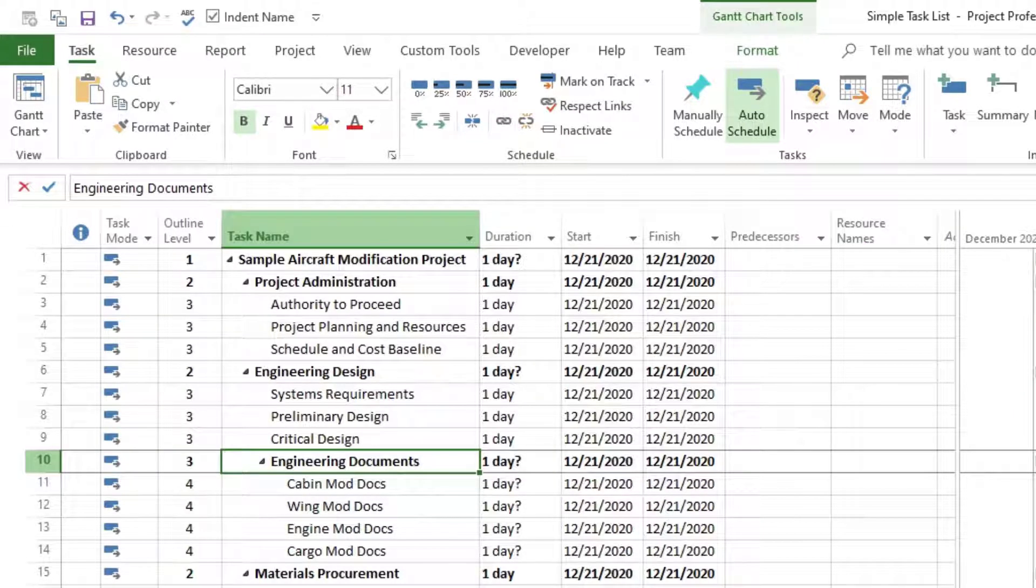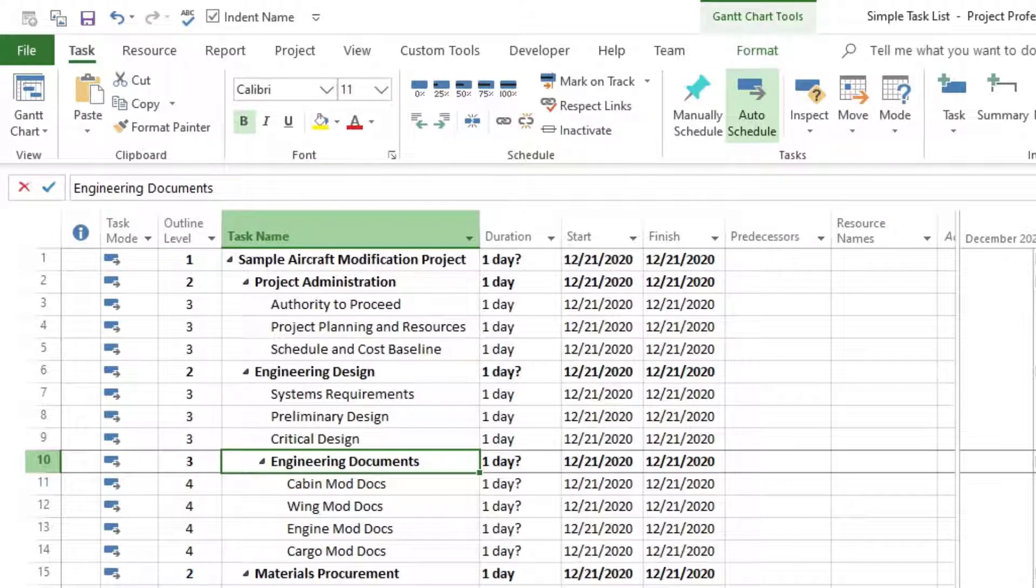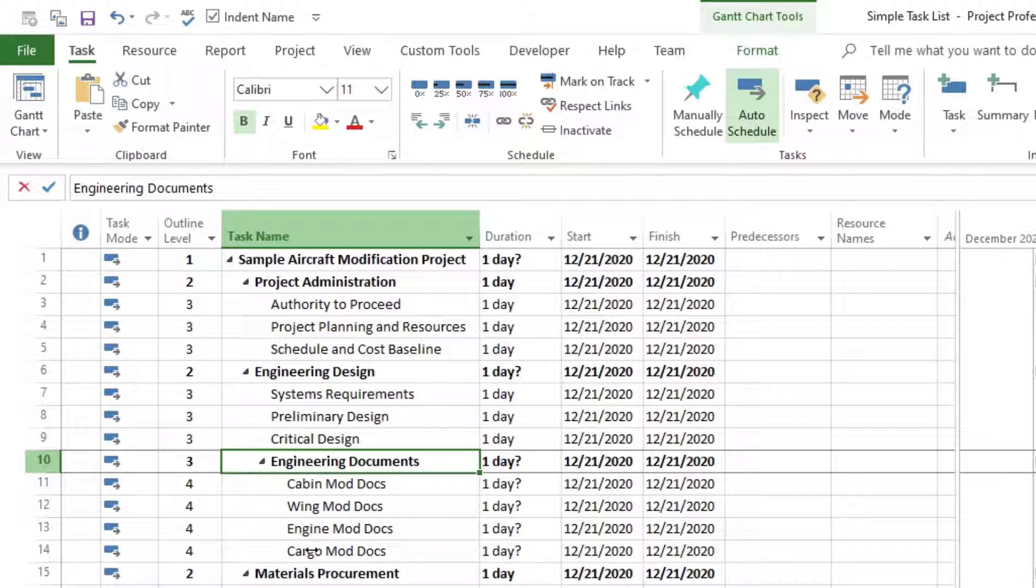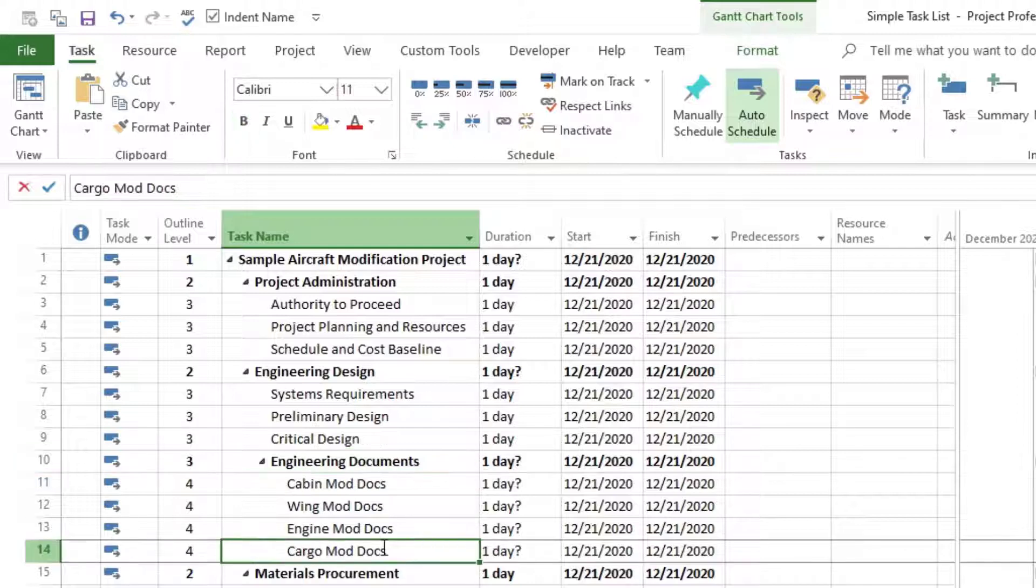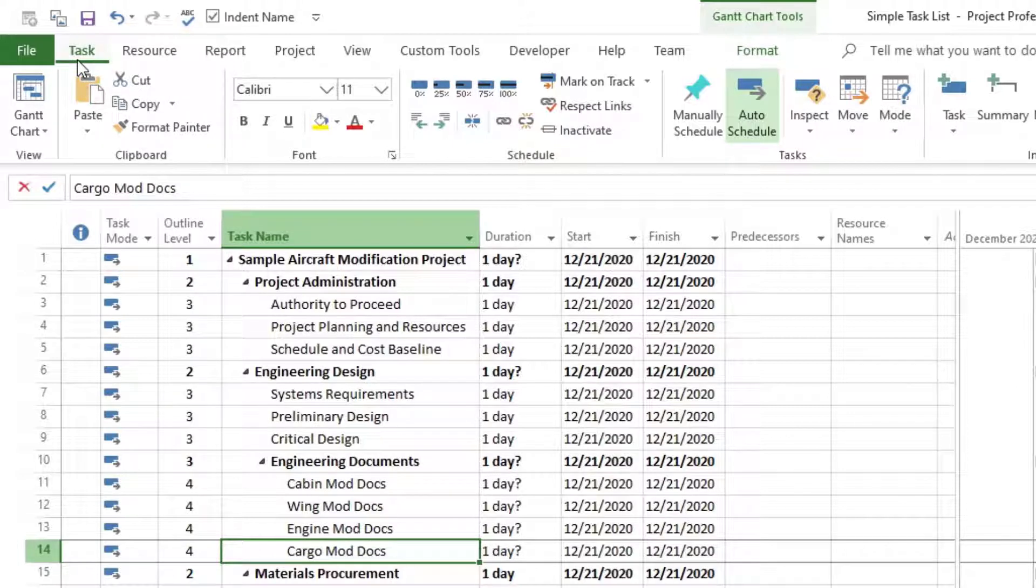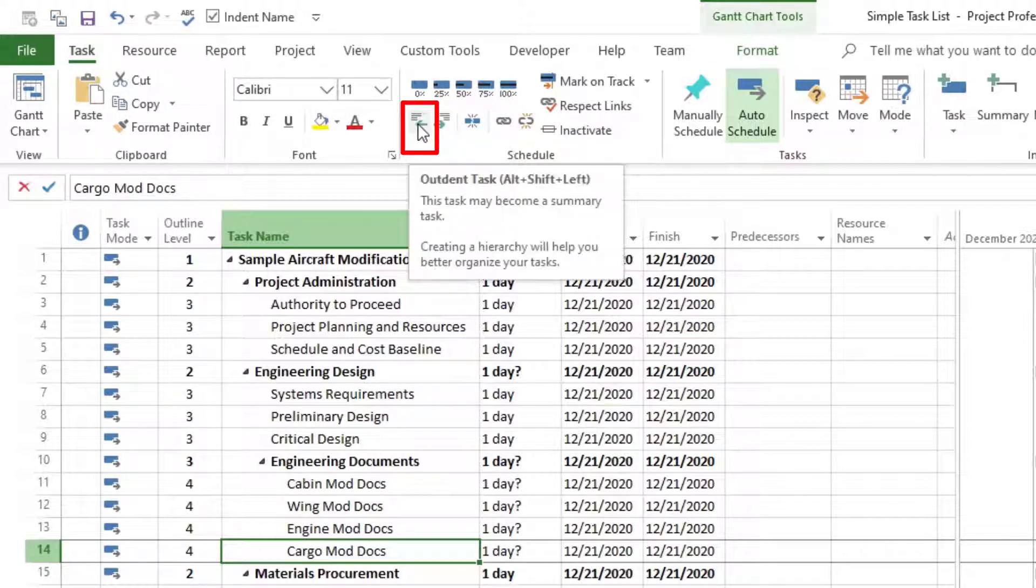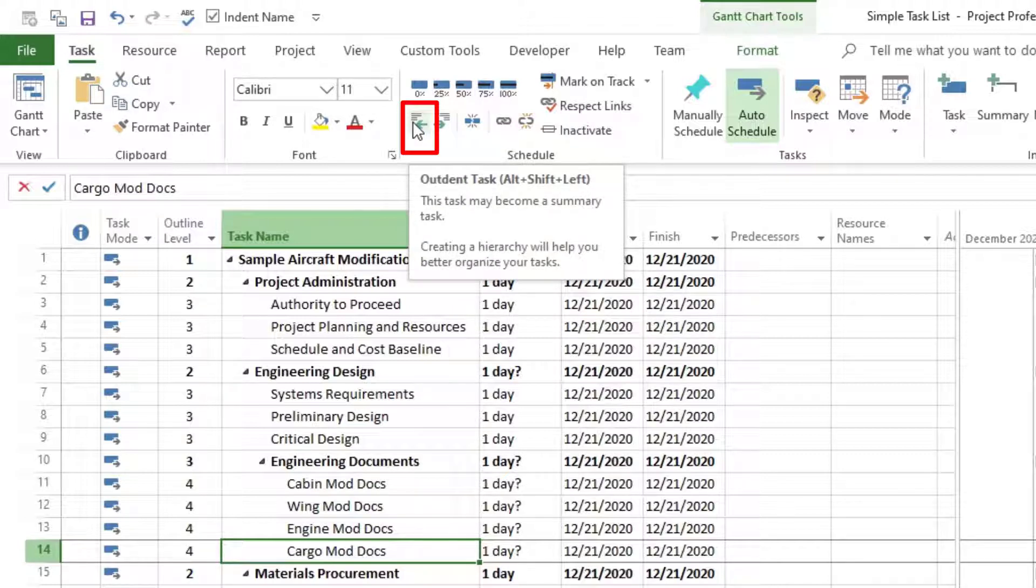Now we will learn how to outdent this task. First, identify the task you want to outdent. We can do this one at a time or as a group. So I'm going to choose this section again that we've been working on and I'm going to choose the last task to outdent. We can go up to our tab task and then click on outdent. So if I hover over it before I click on it, see that it says outdent task. You can use Alt Shift Left buttons on your keyboard as a shortcut to do it quickly.